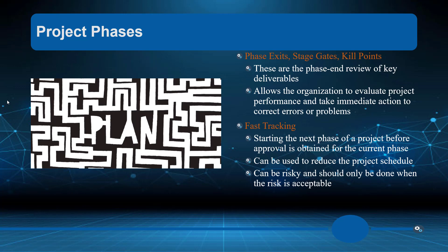So project phases, phase exits, stage gates, kill points. Is today the day we stop the project? Is this the day we kill the project? A lot of times we'll actually build those in so that they're reminders to ask that critical question. I've had projects where we've spent literally 40 hours with five human assets to determine this is not a project we're going to do now — we need to shelf it. We don't have the budget or the resources to do it today.